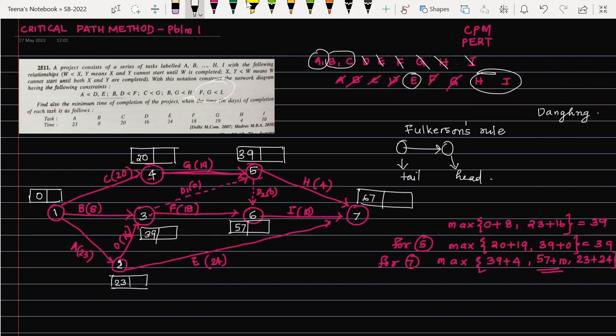In forward pass calculations we always consider the maximum possible time, because we are scheduling a project and setting a maximum limit. The project should be completed within that maximum time allotted. That is the logic behind setting the maximum value for every earliest start time.